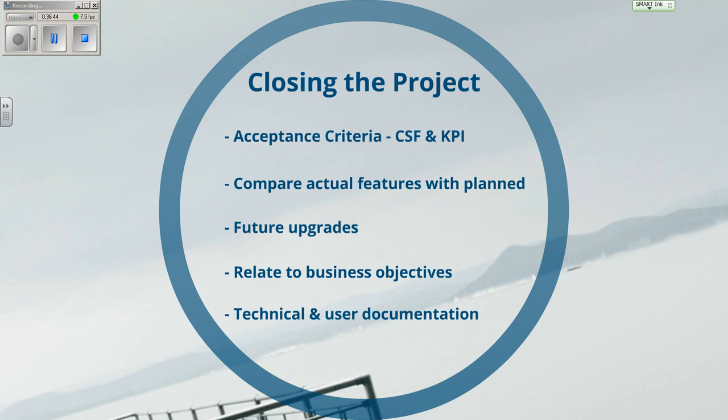Yeah, the technical and user documentation. User documentation is, as you say, things like training manuals, how to use the system. The technical documentation will include things like backup instructions, possibly migration or archive instructions, and might even include the source code. It might be that once you've built the system and you leave, they want their own people to be able to maintain it.